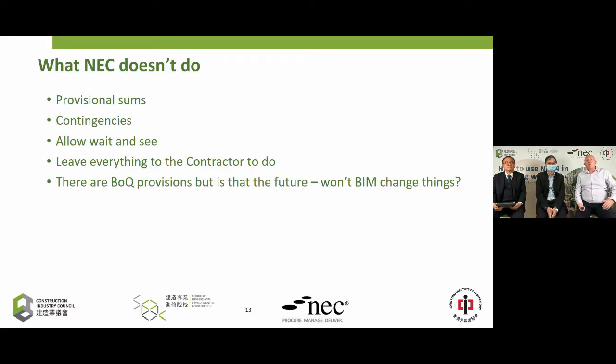So what we don't do, we don't allow you to wait and see. I think probably in the building industry we still like to wait until the job's finished and then go, thank goodness for that. And the day after, start talking about final accounts, which I think is a disaster, a complete disaster. Every business surely will be in a much better place if we have a real-time approach to compensation events and to change. Don't do wait and see on your projects.